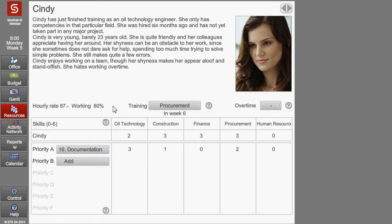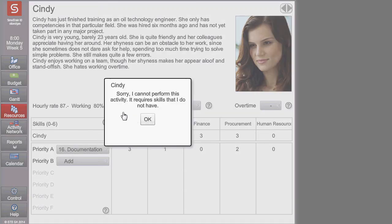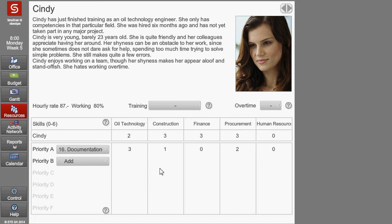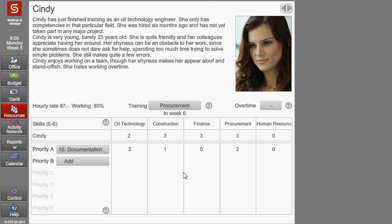Sometimes people refuse to work on different activities. For example, if I ask Cindy to work on activity 6, she refuses because she does not have the required skills for activity 6. However, if I send Cindy on a training and her skills increase by 2 points in procurement, she will accept the assignment even before the training starts.